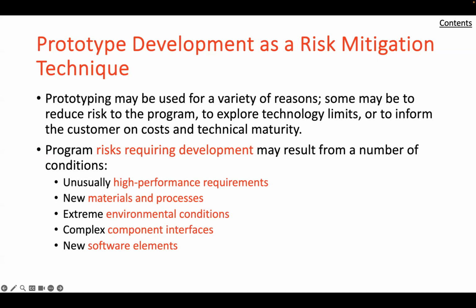The approach is that of risk assessment. What risk may be involved in each phase? Where are the unknowns, such as the areas in which the prior experience is not sufficient? For each potential risk, the likelihood and impact of a failure in that area must be determined.